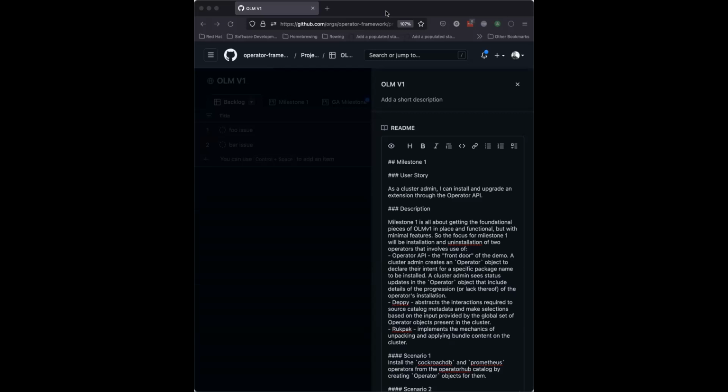So it's tough, right? Because we need to make sure we capture all the things that we come across, but we don't want to work on things that aren't super high priority either. I think that'll be a thing we have to handle case-by-case. The best way to do that is to be constantly refining our backlog and looking at issues that we haven't touched in 3 weeks or a month or something like that.